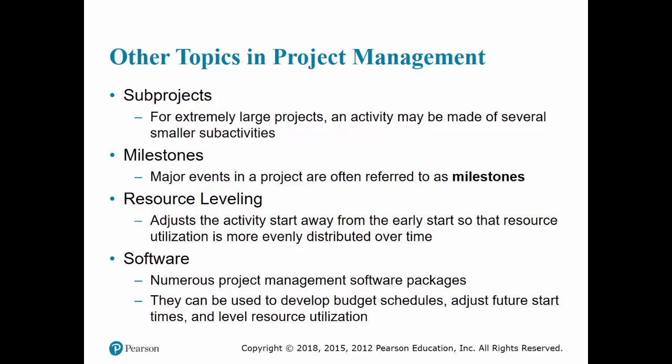Another important aspect of project management is resource leveling. If a critical resource is required for more than one activity, then we have to adjust the schedule of those activities within the earliest and the latest times in such a way that the resources needed are evenly distributed over time and shared by other activities.